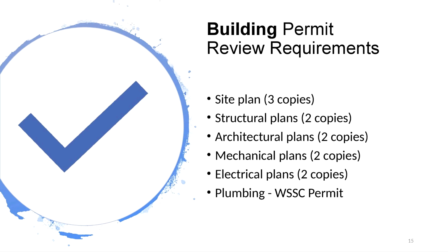The building permit review requirements include the submittal of the following: 3 copies of site plans, 2 copies of structural plans, 2 copies of architectural plans, 2 copies of mechanical plans, 2 copies of electrical plans, and a plumbing permit from WSSC.